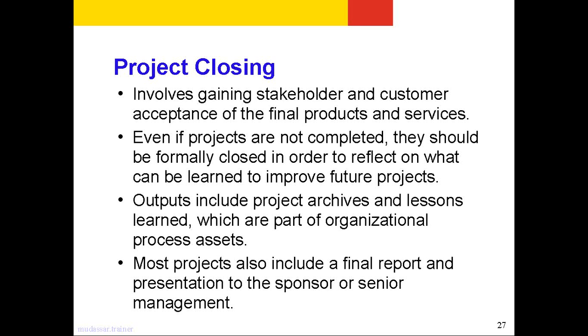Okay, project closing. Then final is the project closing. Project closing involves gaining stakeholder and customer acceptance of the final products and services. Even if the projects are not completed, they should be formally closed in order to reflect on what can be learned to improve future projects. Outputs include project archives and lessons learned, which are part of the organizational process assets. Most projects also include a final report and a presentation to the sponsor or the senior manager.